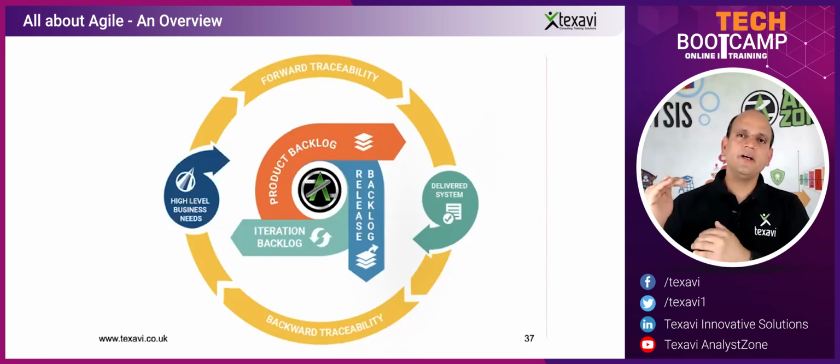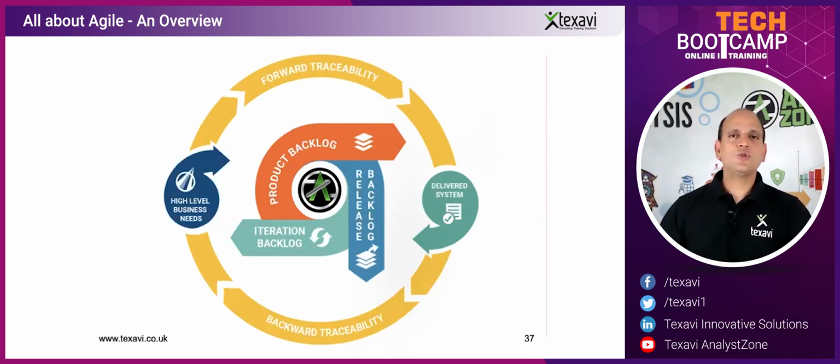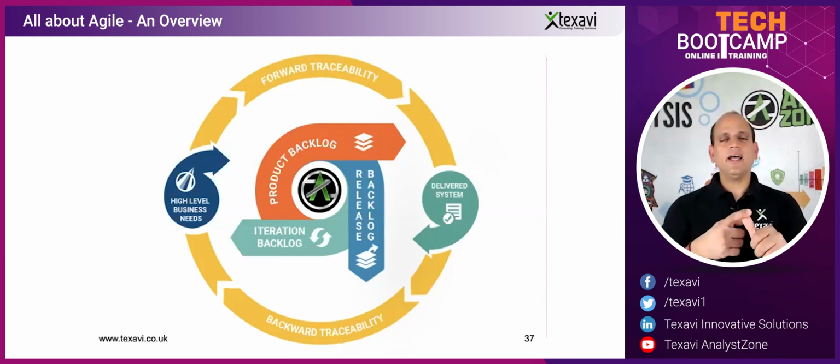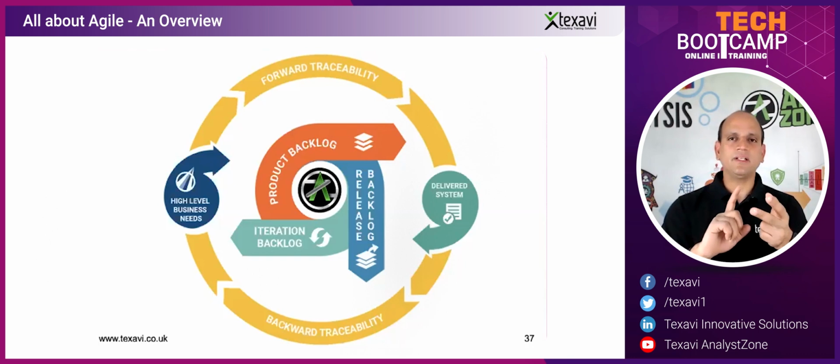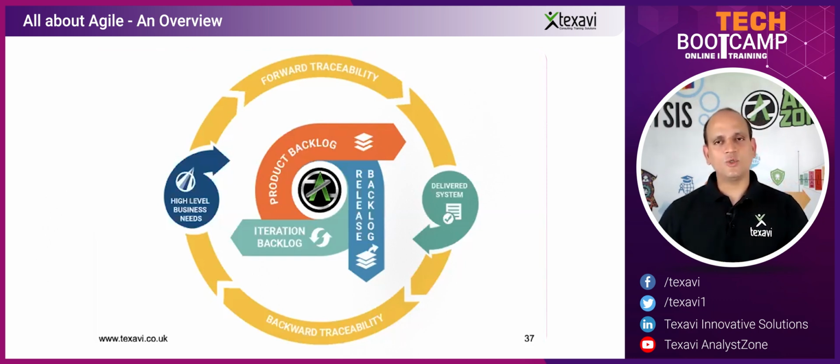Out of those 30 or 40 items within the November release, in the next 2 weeks, which is the iteration, we're going to work firstly on showing the item, then showing one thumbnail image of that item, then the item title, item description, and the item photos. These are the only 4 things we're going to do in the next 2 weeks. So by, let's say, October 17th or 18th, we will complete this part only. We'll focus only on this. We don't worry about everything else.